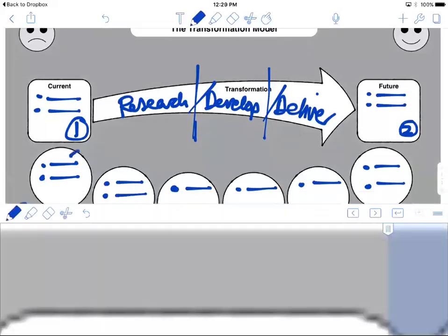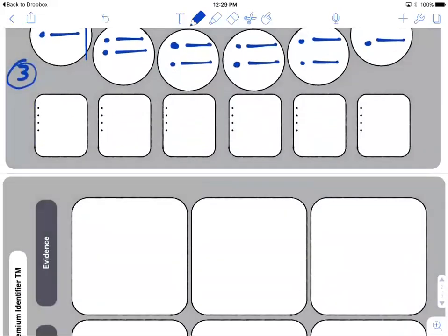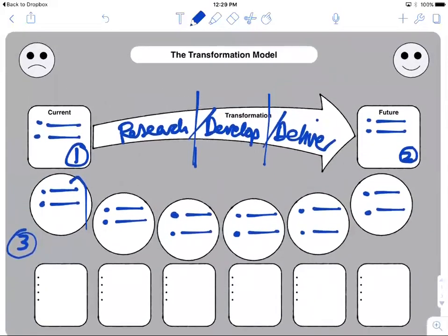And of course, the output of one step, the output of one milestone becomes the input of another milestone. Having identified the top line, and we would normally recommend between 4 and 7 major milestone steps and no more. Having identified the top line, there's a test to apply. The first test is to cover up one of the milestones and simply ask the question, if that milestone did not exist, would we still deliver the project?